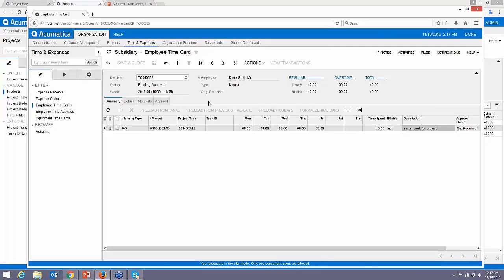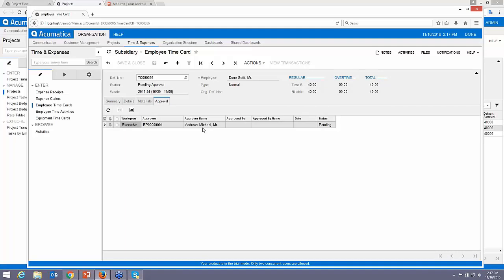So as part of the webinar, you're getting a lesson in how we keep track of making sure people do things that they're authorized to do, somewhat unintentionally. All right, so now you'll see that this is pending approval. So we're going to go in, and you can get a quick look at who's holding them up. Now, this is part of the workflow process. Within the workflow, you can have different people approve different projects. You may have the project manager do an initial approval and then pass the approvals over to the person's boss.